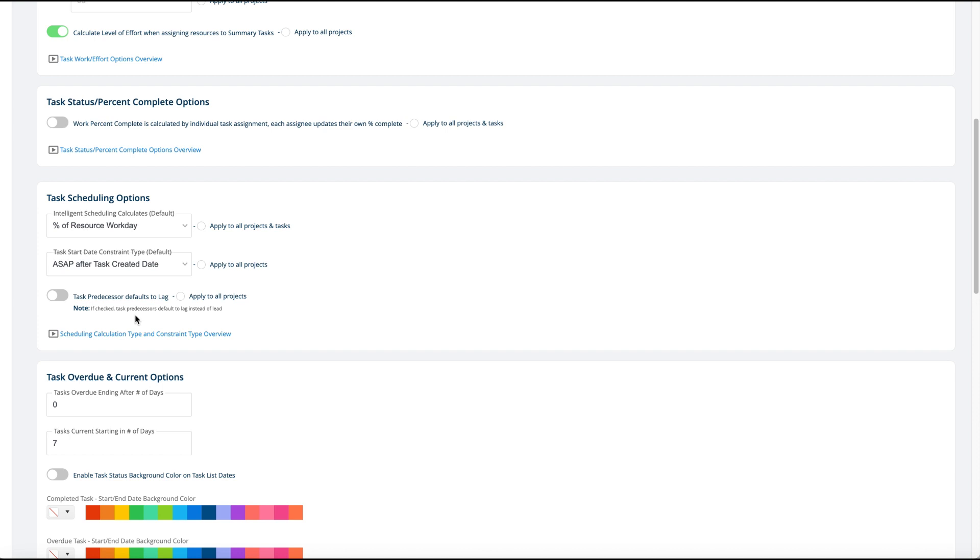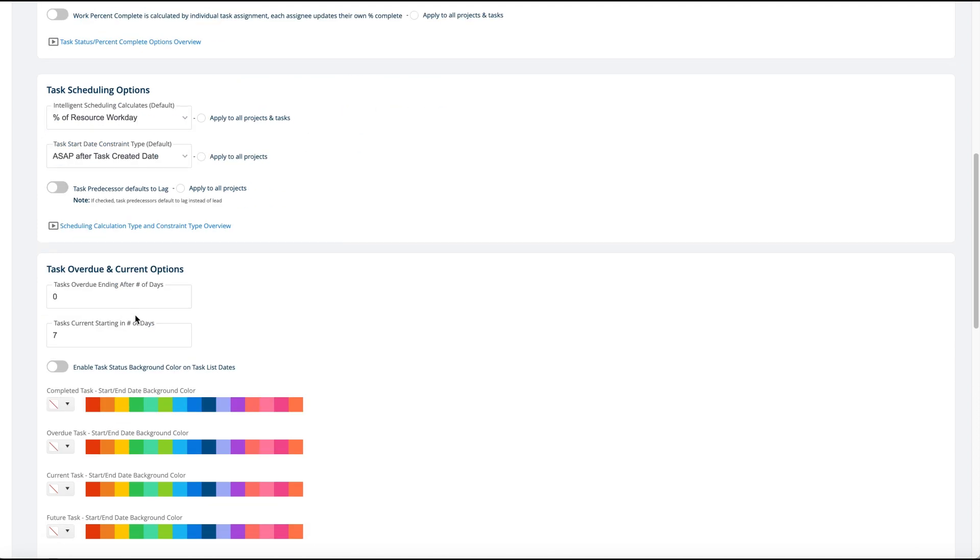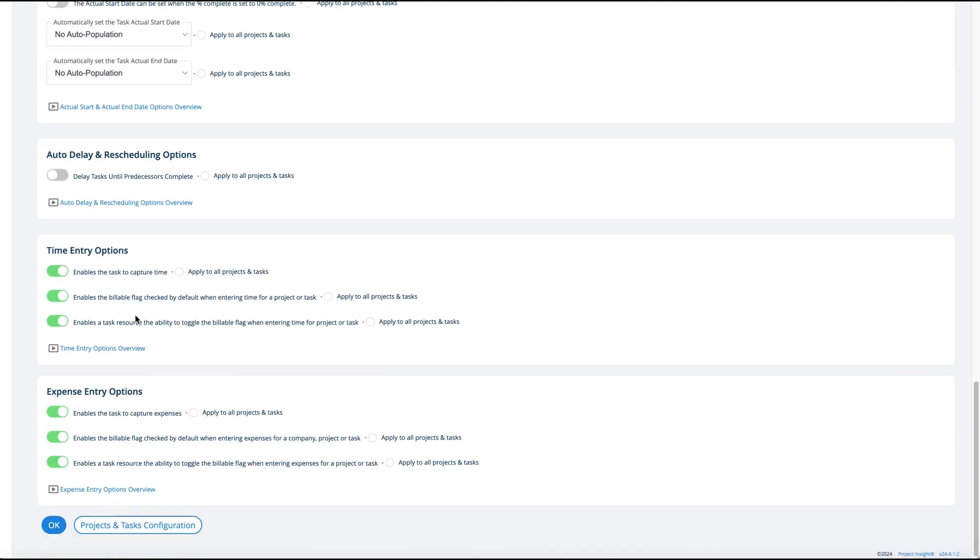For time entry and expense entry options, if you have those turned on in your system, you can enable or disable the task to capture time. This is pretty much on all the time, but this is something clients change: whether or not the billable flag is on by default or not for a task.